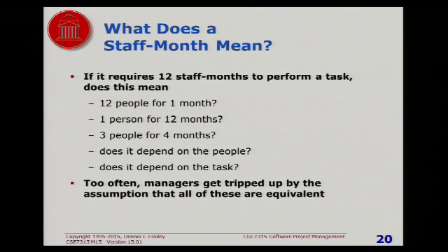Right, it would have to be something they wanted to get done quickly. And if you're going to have 12 people working together, you want them to be very well coordinated, and you want the task to require a relatively small amount of interconnection between the two. So, for example, taking a big warehouse and unloading it and moving everything to another warehouse. That's an example of something where you might take 12 people together and have them all work together for a month.